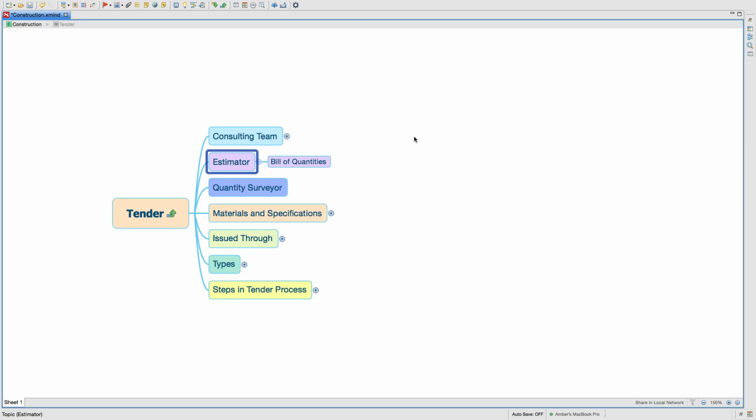And when we get a tender from somebody, we compare what we get from an estimator and what the building contractor has given us. If there is a lot of margin there, we can negotiate the price. Although it costs us about $2,000 to get an estimation done on a project, that $2,000 can actually save us 10-20 grand on the other side when I'm negotiating the price with the builder.